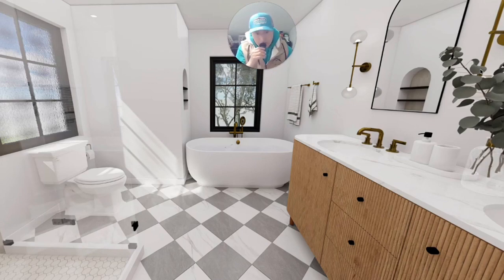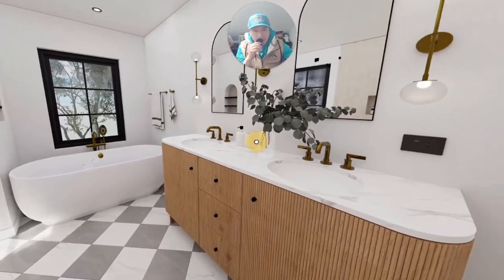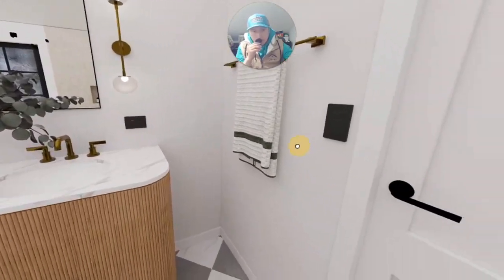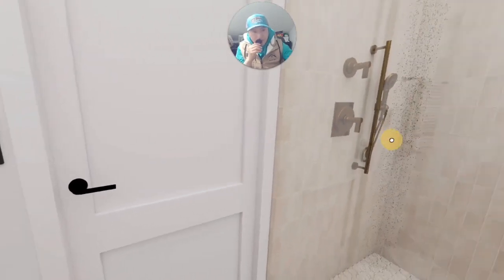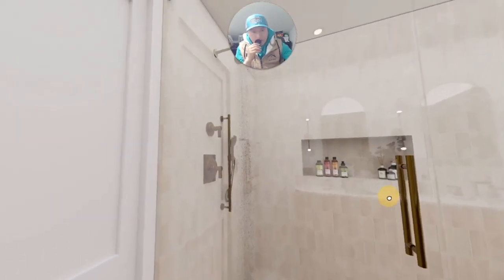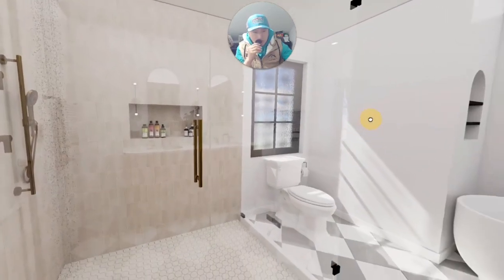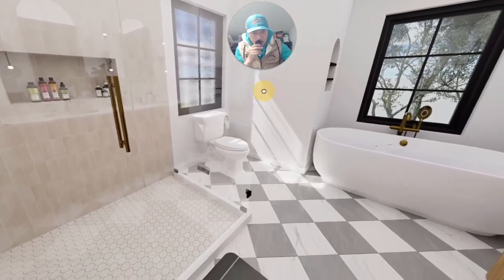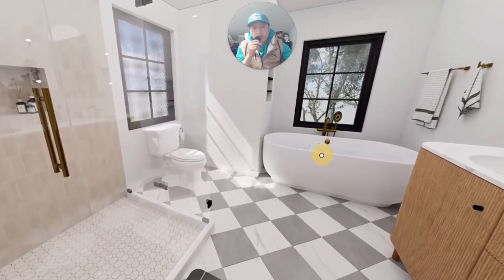Take a look. This right here is a render. So it hasn't been built yet, but it's very realistic. This is what the space is going to look like. So pre-designing your space, rendering it, and approving the final look will be essential. And that's the way you're going to be able to control your budget. If you start the renovation already, it will be a lot more difficult to control.